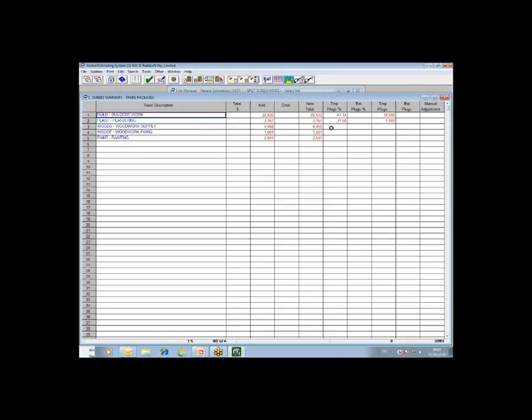What you then can simply do is, once, as I say, all your subcontract packages have been awarded, each item on the subby summary will be highlighted in blue. When that's done, you can run the create new estimate function, which is this green arrow tick box button.